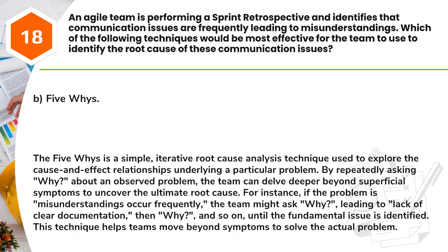Answer: B. 5 Whys. The 5 Whys is a simple, iterative root cause analysis technique used to explore the cause and effect relationships underlying a particular problem. By repeatedly asking why about an observed problem, the team can delve deeper beyond superficial symptoms to uncover the ultimate root cause. For instance, if the problem is misunderstandings occur frequently, the team might ask why, leading to lack of clear documentation, then why, and so on, until the fundamental issue is identified. This technique helps teams move beyond symptoms to solve the actual problem.